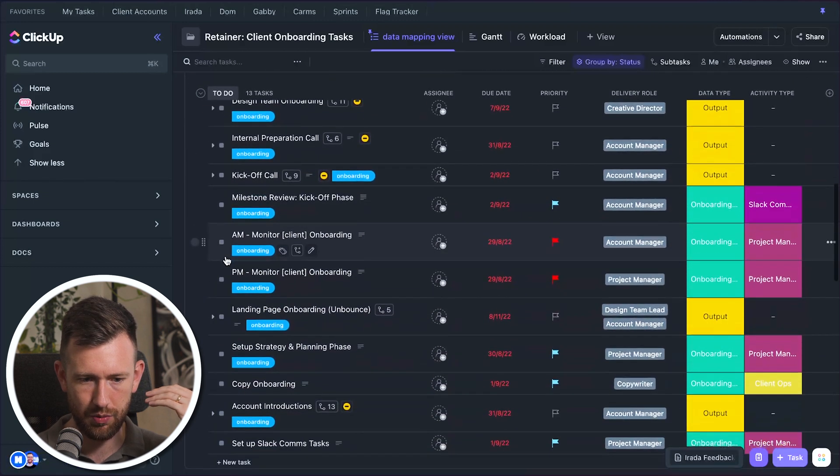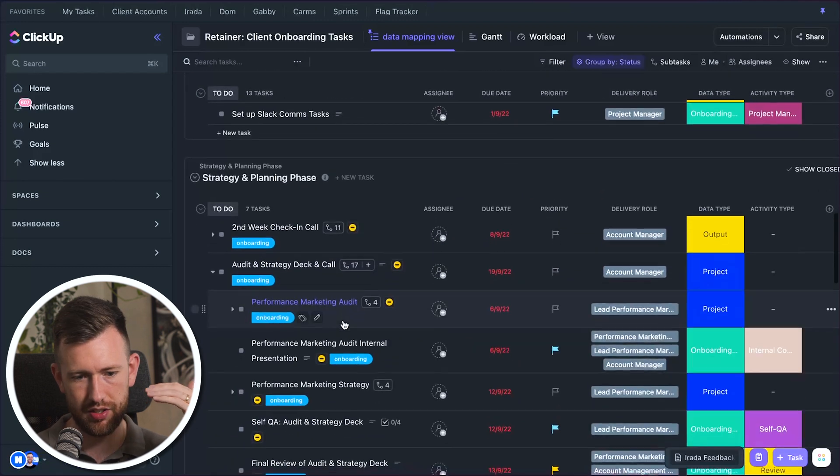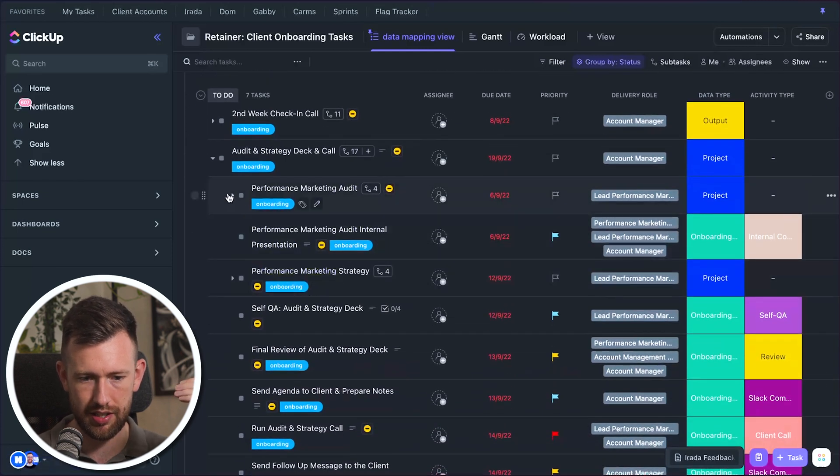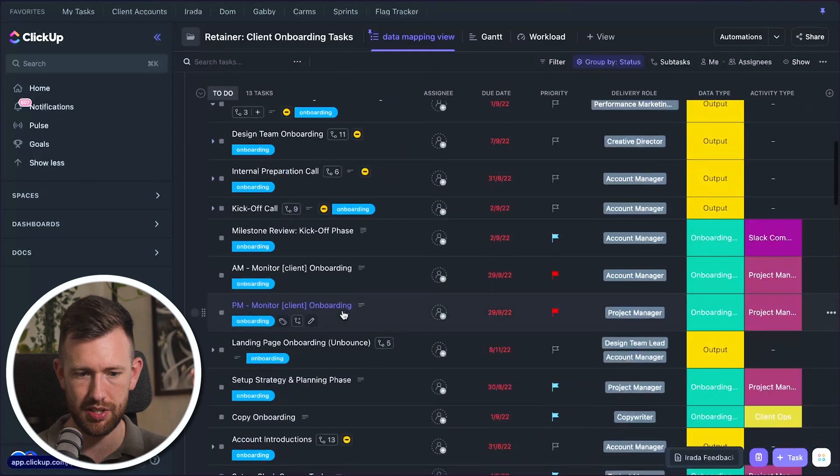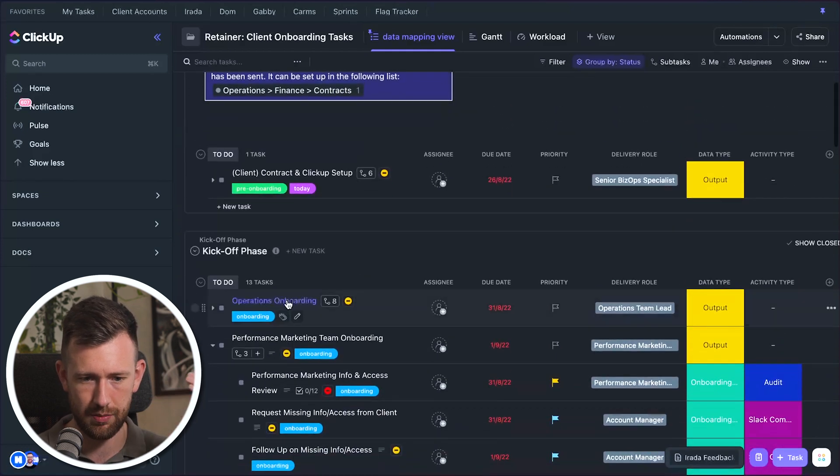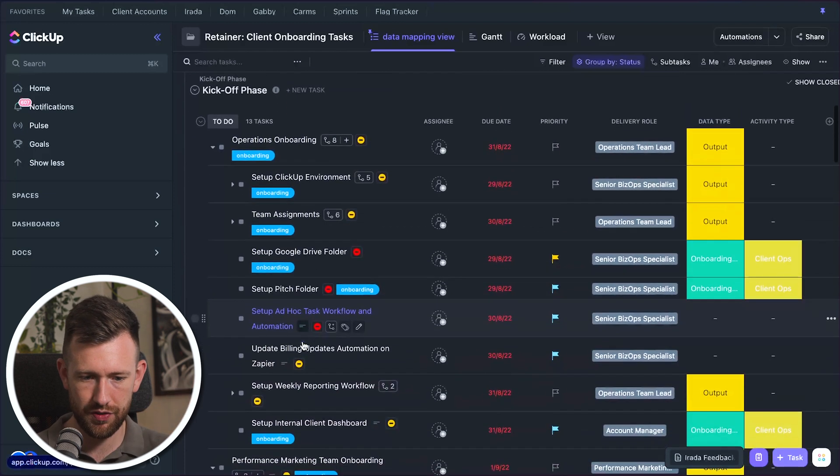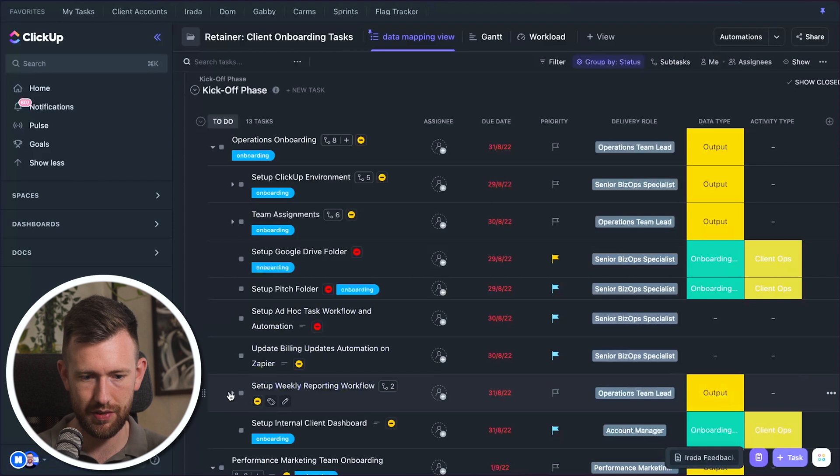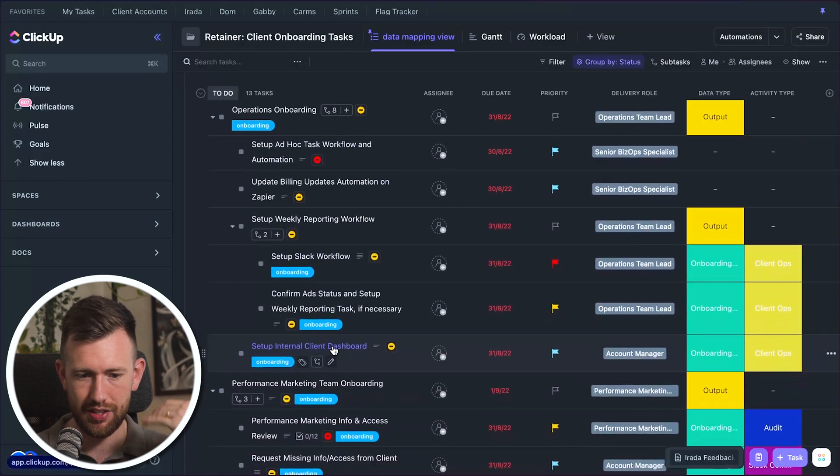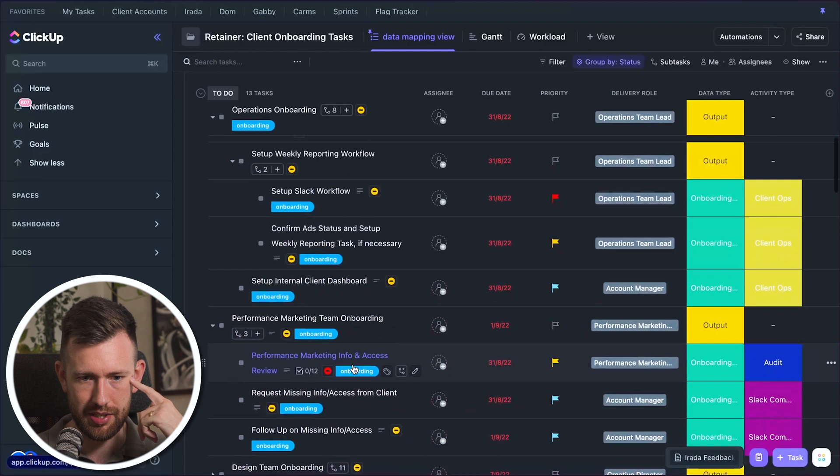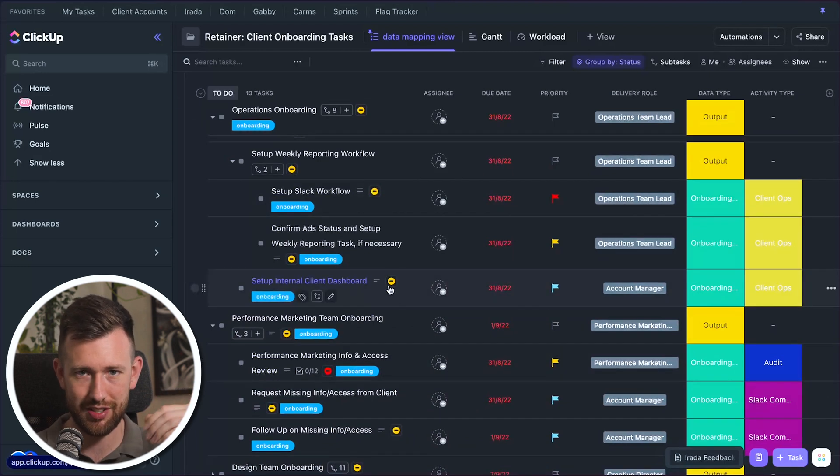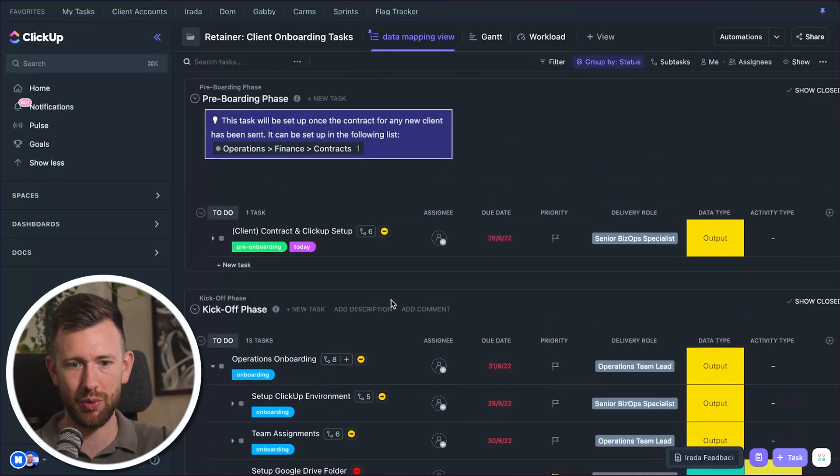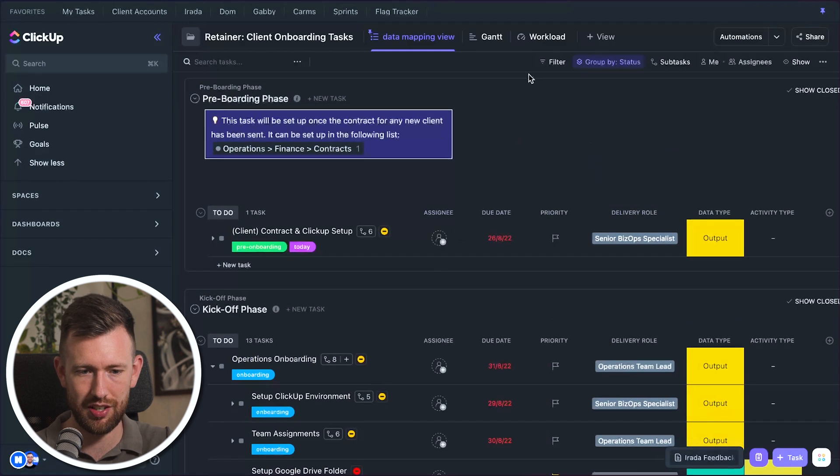I could go in and look at what does our team need to do for the audit and strategy call? What do they need to prepare? So there's a performance marketing audit, then there's the reviews, QAs, there's subtasks within these. There's a bunch of different things across all of our teams when we onboard a client. This enables us to duplicate this folder for every new client that onboards, automatically assign all of these steps to the right people along with due dates and other items like this. So this is just one way we're using a tool like ClickUp to help us with systemizing some workflows. But to be honest, this is not even scratching the surface. We use ClickUp for so many things and it's absolutely imperative if you want to scale your business and your agency that you have a project management tool set up.